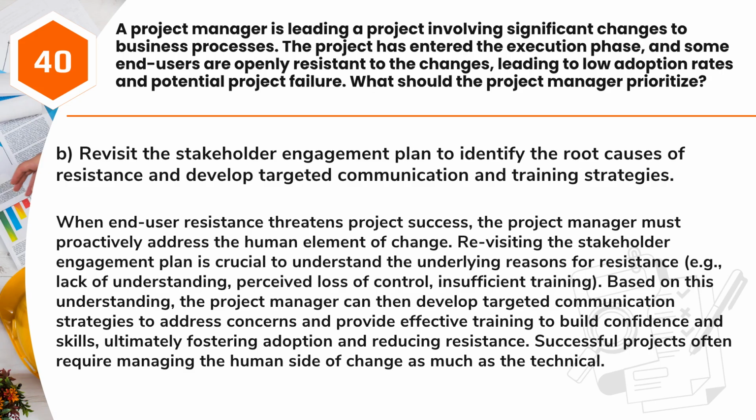Revisiting the stakeholder engagement plan is crucial to understand the underlying reasons for resistance, e.g., lack of understanding, perceived loss of control, insufficient training. Based on this understanding, the project manager can then develop targeted communication strategies to address concerns and provide effective training to build confidence and skills, ultimately fostering adoption and reducing resistance. Successful projects often require managing the human side of change as much as the technical.